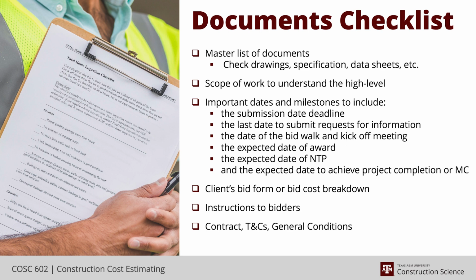Scope of work, as simple as it is, I've received bid packages that were just a bunch of information, and through an RFI process and trying to piece the details together, we had to kind of build a scope of work. That was very frustrating and lost a lot of time. And then you're basically submitting a proposal that you're not 100% sure is what they want, because they can't really tell you what they want.